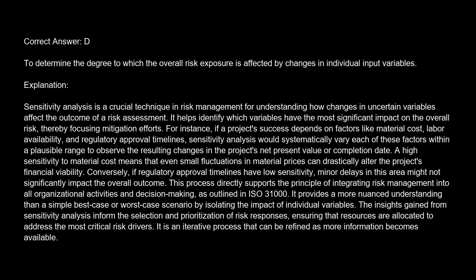For instance, if a project's success depends on factors like material cost, labor availability, and regulatory approval timelines, sensitivity analysis would systematically vary each of these factors within a plausible range to observe the resulting changes in the project's net present value or completion date. A high sensitivity to material cost means that even small fluctuations in material prices can drastically alter the project's financial viability. Conversely, if regulatory approval timelines have low sensitivity, minor delays in this area might not significantly impact the overall outcome.